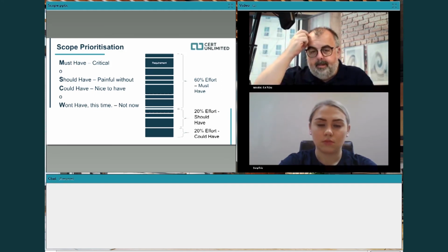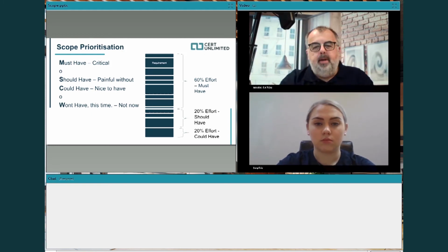And this is once again where prioritisation really comes into place, because if something comes in that we think is critical, then we can replace something that was just a could have, something that would have been nice to have.